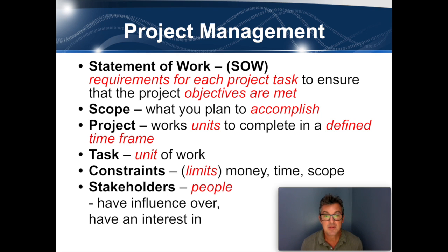The stakeholders are people who have influence, they have interest. When we talk about CIW, if I was working for CIW and making a new certification exam for something different, not IBA, but let's say a new one, there's a bunch of people involved. Students who are going to take the test, teachers who are going to teach it, district people who are going to be administrating it, the industry, people who that certification would serve, right? Someone in the IT industry. You have federal people. You have the people who are trying to sell the product, right? Someone's trying to sell the CIW certification exam test to school districts. All these people who are involved are considered stakeholders.